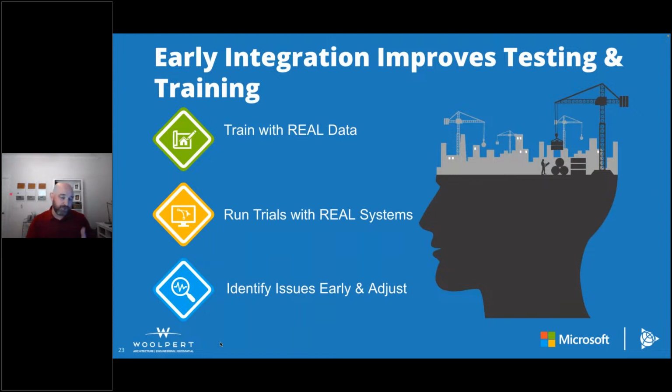So as we were running through terminal trials, which is a key component of ORAT for airports, we were actually able to put the software in the hands of the technicians that were being trained and running through the trials. And so they were using the software that they were going to use on day one, and they were interacting with the actual asset data for that facility. So they weren't having to just simulate, well, okay, this is where I would enter a work order at this point in the process. They were actually doing that in the EAM system that was going to be used with real data. So both the training and the trials can happen with real data.